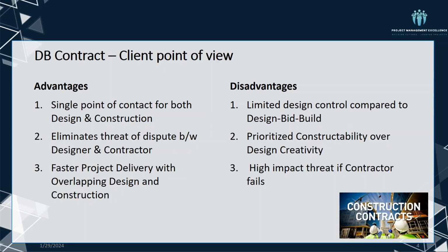Also, because both design and construction are handed over to a single company, if that company is not as professional as they introduce themselves, you get impacted more compared to design-bid-build project delivery. Think about it. Giving time for both design and construction to a company who fails in many aspects of project delivery, with design quality issues, executing design at site, interface management with authorities or other contractors, etc.